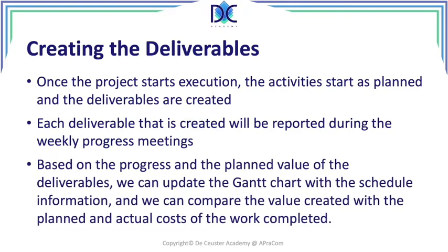Now, based on the progress and the planned value of the deliverables, we can update the Gantt chart with the schedule information and compare the value created with the planned and actual costs of the work completed. So that's more a part related to earned value management.